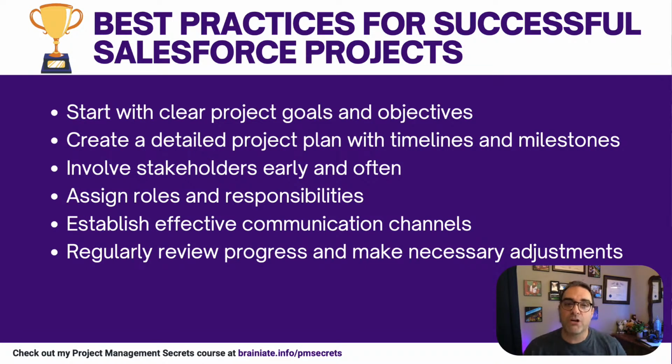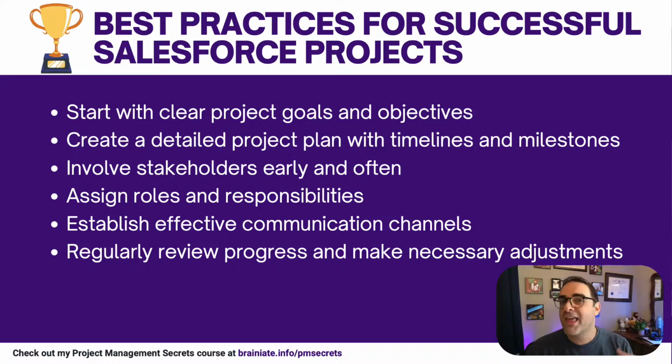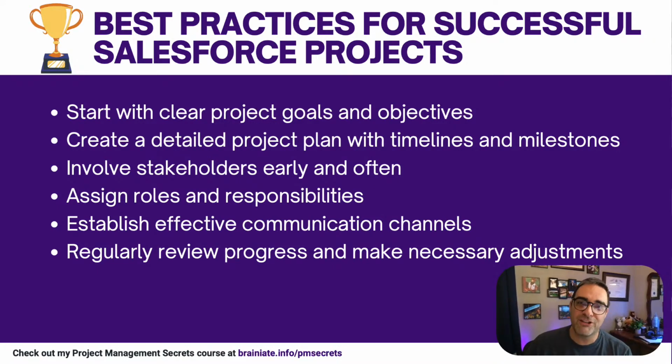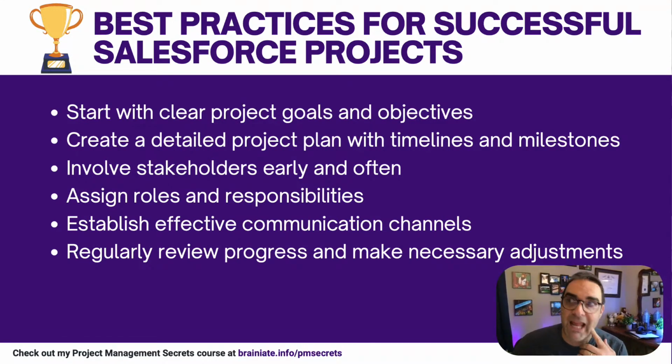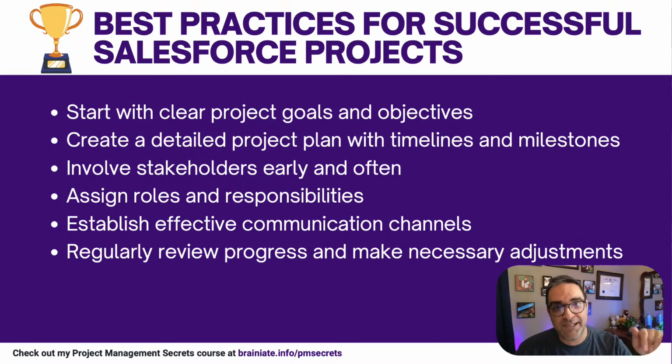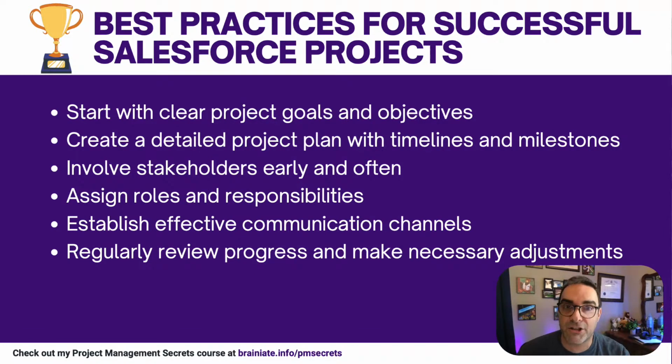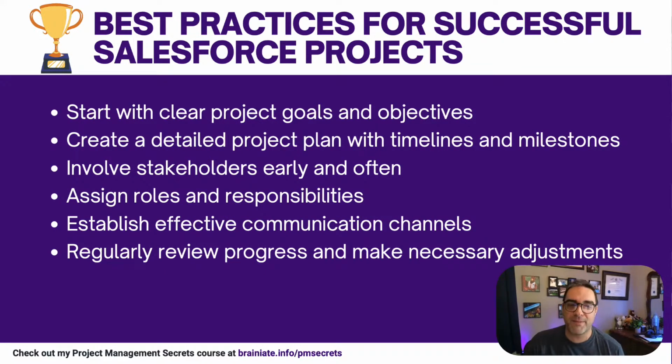But either way, in order to make the most out of your Salesforce projects, you start with some clear project goals and objectives. You create a detailed project plan with timelines and milestones. Involve your stakeholders early. You don't start bringing them into the loop on a project when you're about to go live. When it's time to do UAT testing, that's not when you should first be introducing your stakeholders to the project, because it's going to be too late. That's when you're going to realize that what you want them to do UAT testing on is not even a match for the way they do things or what they need from this particular project or from the system.